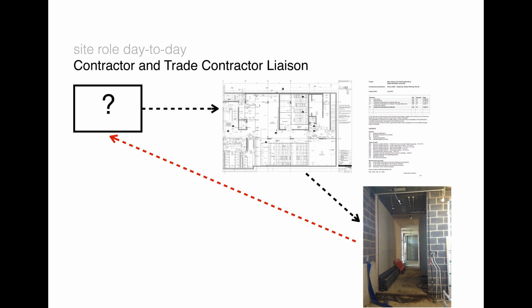And generally, if it's pretty clear, they don't raise the question. So generally, queries are about interfaces, probably between stuff that's down to us to design. So there'll be packages which are completely architect designed, and then there'll be packages that are contractor design or specialist design, which have some design responsibility for the subcontractor. It's generally where the interface of those meet, where people say, well, we're expecting you to design that bit, or we're expecting you to design that bit, and questions arise there.